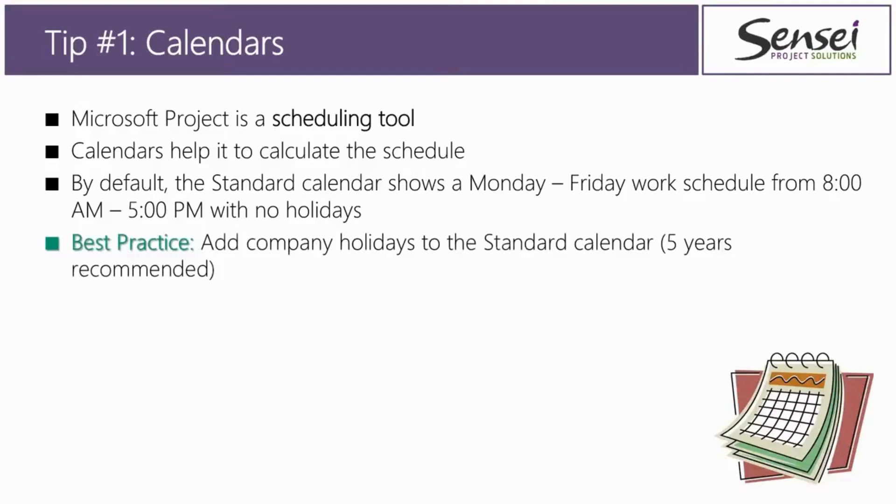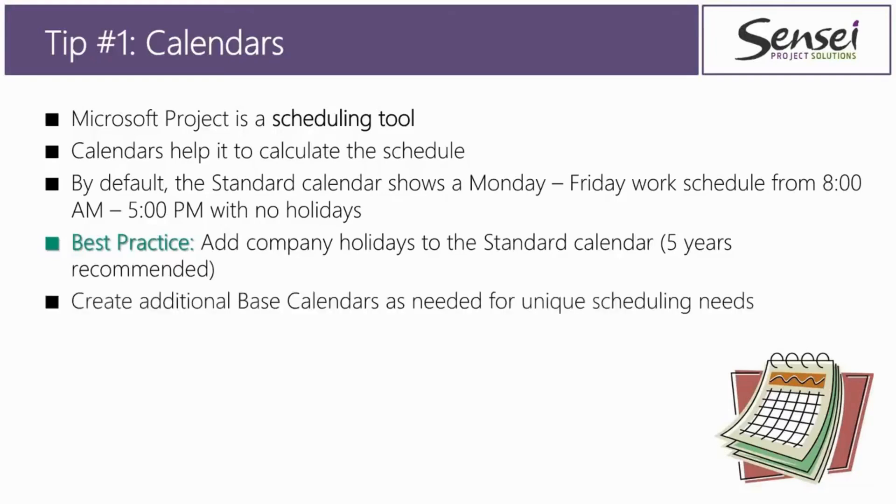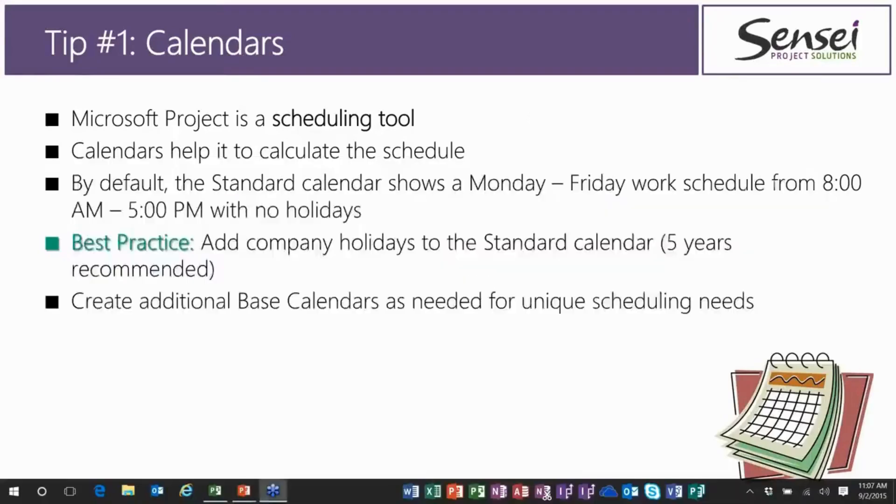So here's a best practice for you. I recommend that you add holidays, your company holidays, to the standard calendar, and I would recommend at least five years to make it worth your while. And then beyond this, I would also recommend you create additional base calendars as needed for any unique scheduling needs you might have.